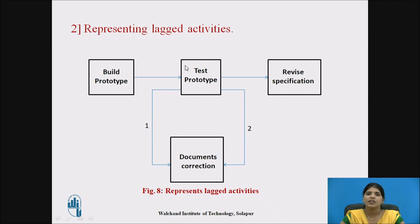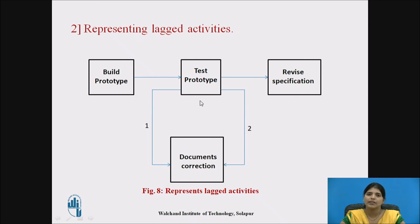Next is representing lagged activities. Here, test prototype and document corrections are two parallel activities. The value '1' indicates that document corrections can start one day after the start of the prototype, and '2' indicates that document correction has been completed two days after the test prototyping is completed. These two activities are lagged.